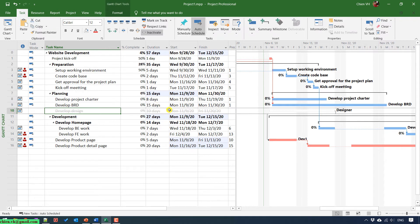The duration of this task will be excluded from the total timeline of this project. And you see here, before we made the task inactive, the duration of this project was 67 days. But now, if you reduce 10 days, it will be 57 days.